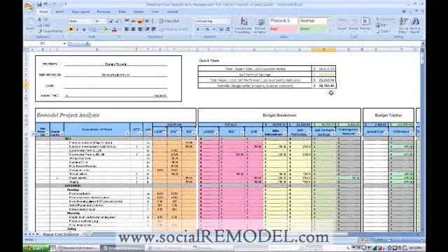And then this remodel budget after property is under contract, that's basically what I use as a gauge. That's essentially the self-performed cost minus the contingency amount. So it's really the best case scenario. If you think that you can self-perform all those line items and feel comfortable with that, and that you can cut out all that contingency, then the remodel budget may be able to cut down all the way to $18,785.